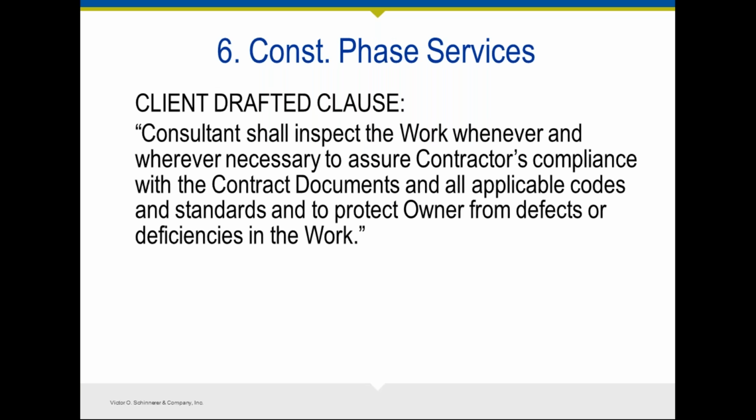All right. The last clause that I wanted to cover is construction-based services. Here's the client-drafted clause. Consultants shall inspect the work whenever and wherever necessary to assure contractors' compliance with the contract documents and all applicable codes and standards and to protect owner from defects or deficiencies in the work. Again, this is really not the typical role of a design professional. And one of the great benefits, in my opinion, of the standard form agreement is that the role of the design professional during the construction phase is actually well defined in both your agreements and in the owner-contractor agreement.